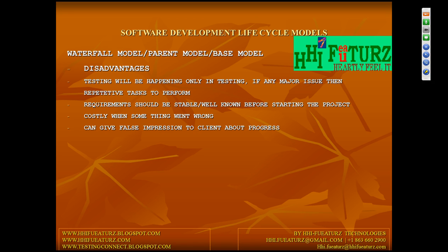Another important drawback of the waterfall model is that the client will give you requirements and you will develop all of them, but you deliver the project to the client only at the end of the project, after 1 year, 2 years or 3 years. After 3 years, when your client receives the project, as soon as he sees it, he may feel, oh, this is a very simple application.